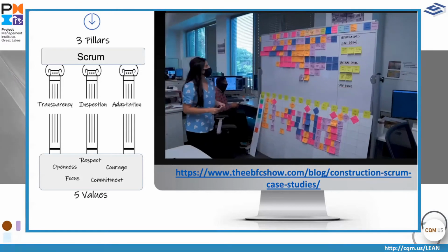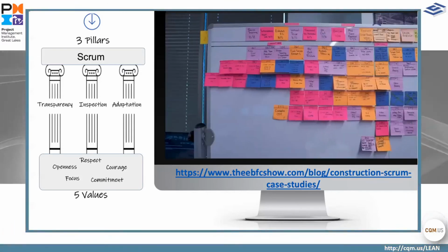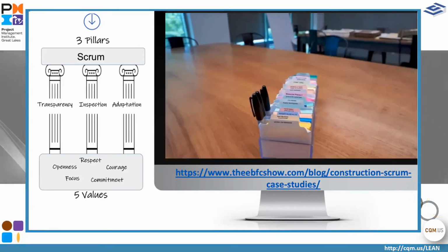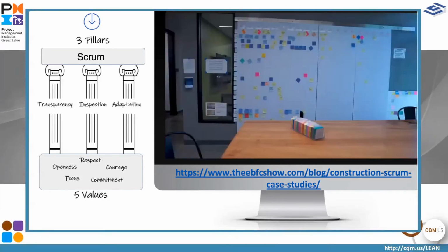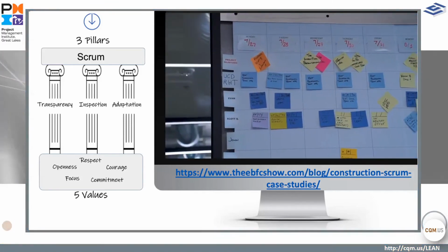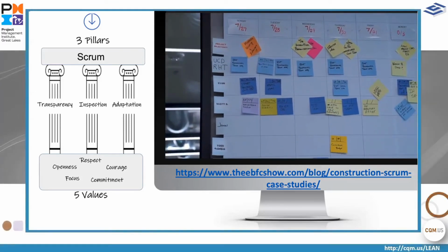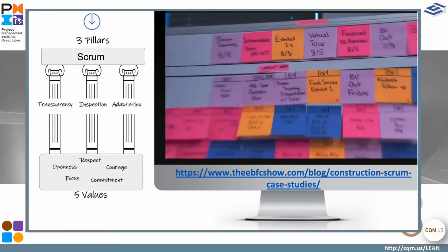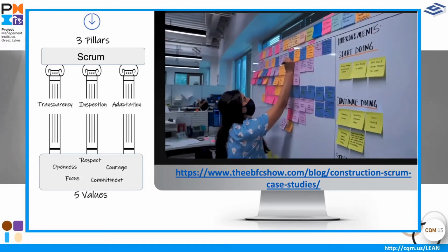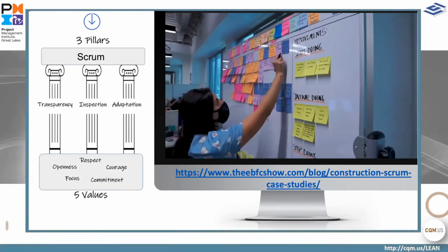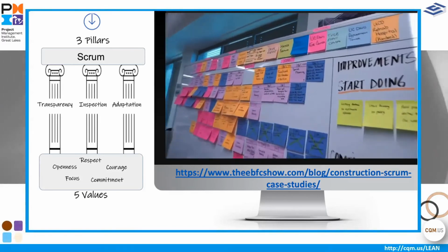The top outlines our milestones, showing us what is priority. On the right side of our board, it lists out what projects we're working on, so the colors match the big pre-con board, so it's easy for anyone in the office to see what projects we're working on. Going down the board, we have our current week's tags on the left side, and what we're currently working on is in the middle, and as we finish each tag, we move it to the right side, so the board flows from left to right.